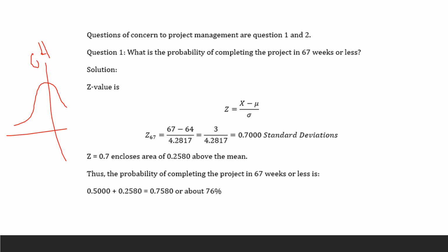That's just getting the difference right there, and then divided by the standard deviation. So you're going to get about 70%. So now get the Z value, go all the way down to your normal distribution table. I give you the website in one of the slides. Put this in and look for that number in your table.